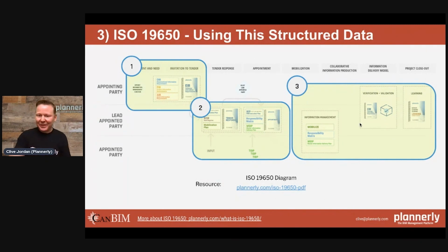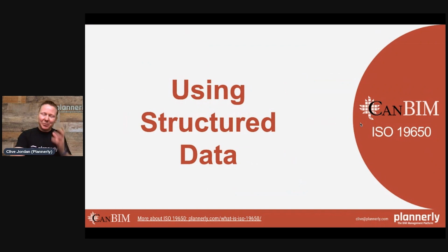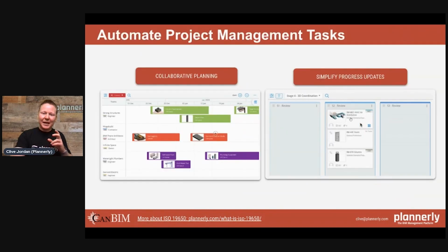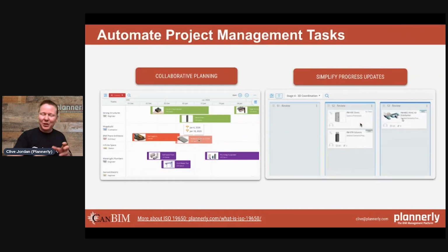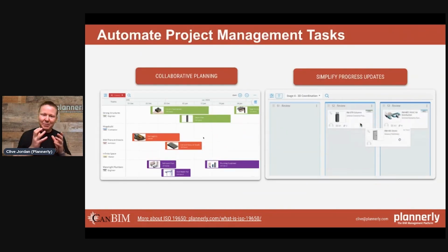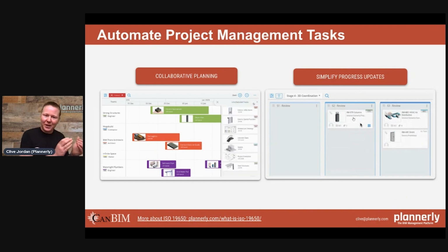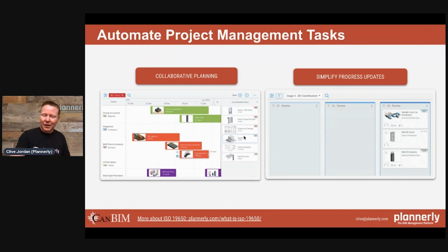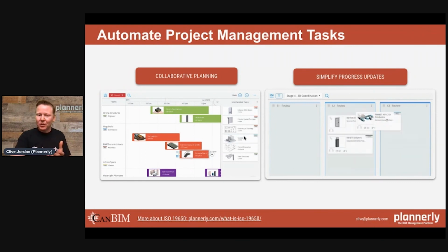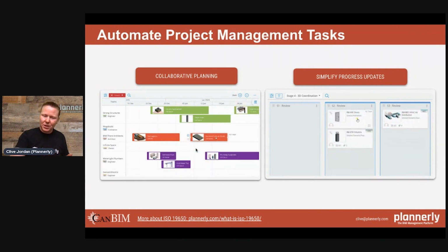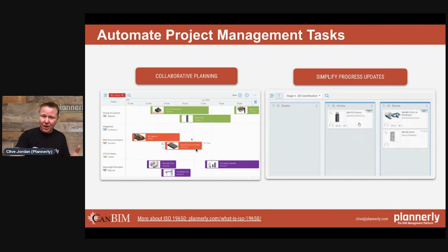The third step is looking at how we use that structured data to be able to deliver. And I'm going to go through a few examples, 4 examples very quickly here. But essentially, you can use any tools to do this. But the point is, if you've already defined all of those collaborative requirements and you've got a set of tasks, you've essentially just got to put a start and end date to those tasks to have a schedule of requirements of when people are doing things.